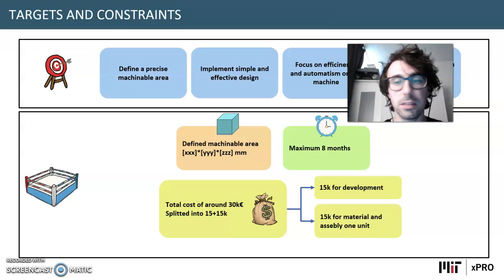The budget is 30,000 euro, split into 15,000 for development, so for the design process, and 15,000 has to be the cost of purely the material and the assembly process. And the time schedule should be about 8 months.